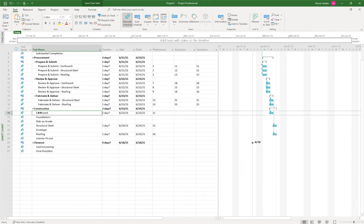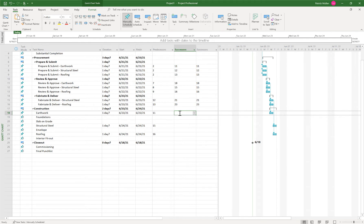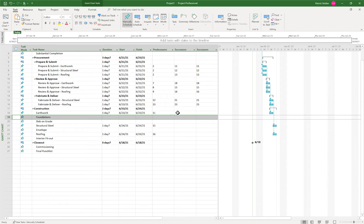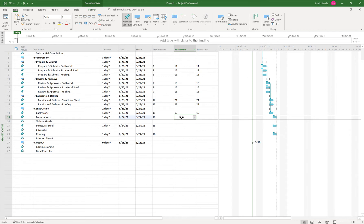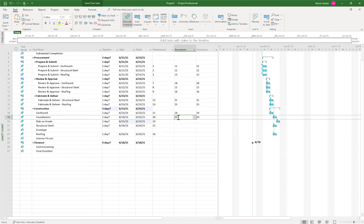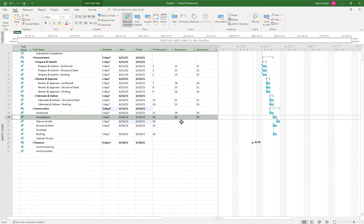And if I wanted my earthwork to be the predecessor to foundations, I would just say earthwork. And I could type in the row number that I want to be the successor. So in this case, earthwork is on row 18 and I want it to be a predecessor to row 19. So we'll do 19. And if I wanted foundations to be the predecessor to slab on grade, I could go 20. And you'll notice when I type in 20, the slab on grade predecessor becomes 19, which is foundation. So that's the other way.